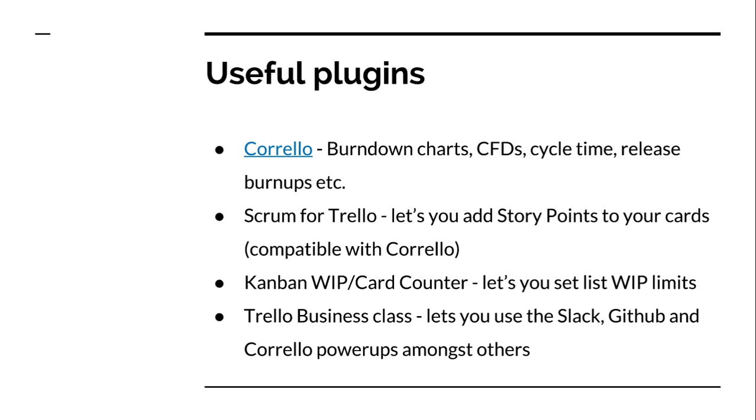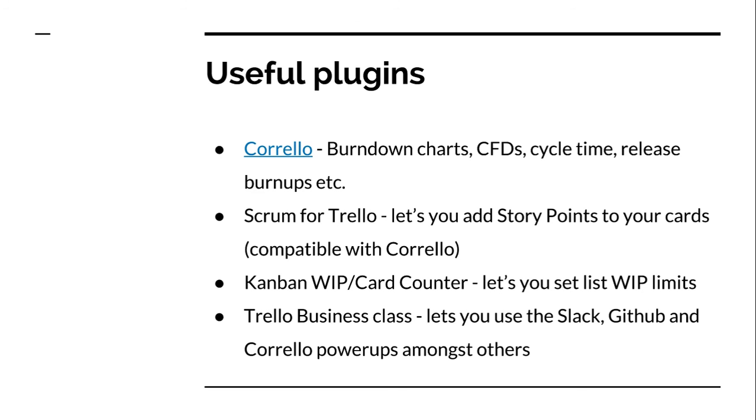There's also Kanban work in progress, or card counters, two different plugins. They're plugins for Chrome. They'll let you set work in progress limits on your lists that won't show up in anything other than Chrome for anyone who hasn't got the Chrome plugin, but it can be a useful way just if you want to set those limits up. And also, Trello business class is worth checking out. It gives you some nice integrations to Slack and GitHub, as well as some other power-ups, including there's a Corello power-up that lets the team see the burndown chart directly in Trello without having to go off and log into Corello to go and see it.